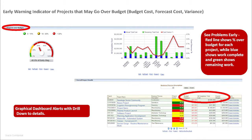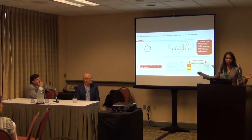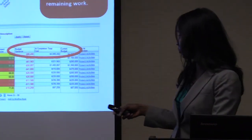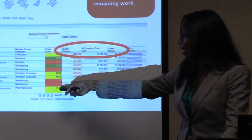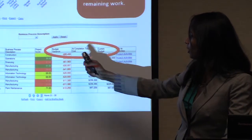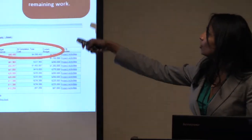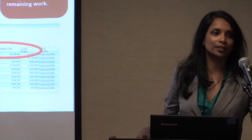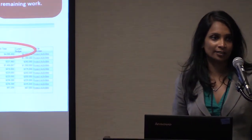Early warning indicators — things like being able to do stoplighting functionality. We're talking about the whole infrastructure behind the scenes that's combining the data, bringing it together, identifying the stoplights, and which ones are the at-risk projects — being able to look at the actual variance in cost in this particular case.